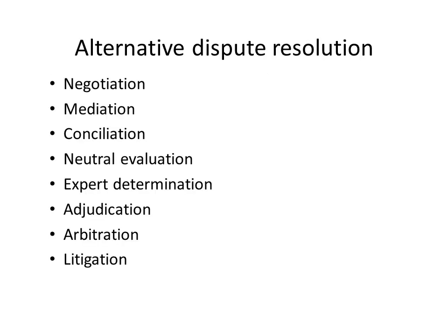We may be involved in dispute resolution, and we can use the ADR, alternative dispute resolution methods. Strictly all these aren't alternative, they're the full list of dispute resolution, going from the soft negotiation right through to the expensive litigation, and possibly more and more now people are using mediation. It's a less costly and a more friendly way of resolving disputes.